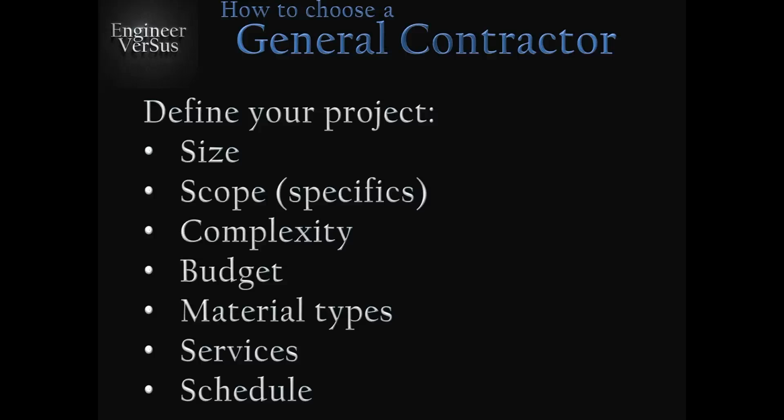But do tell them your budget and be reasonable about it. Tell them that, hey, if your absolute budget is $100,000, they might budget down to, say, $80,000 and then add in items as you go in order to fit your budget, so that you never exceed the $100,000. But if something goes wrong with structure or something like that, they have $20,000 extra dollars to work with.